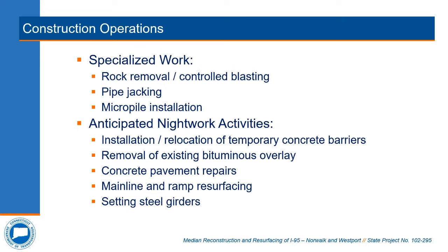In addition to the lateral slide installation of the new Bridge 62, there are other specialized work operations that will be performed as part of Project 102-295. Specific to the issue of controlled blasting, the contract documents limit the performance of this work to daylight off-peak hours. It further requires a minimum 2-hour period between detonations. The contractor is also responsible for the containment and collection of any debris generated by the blasting operation.